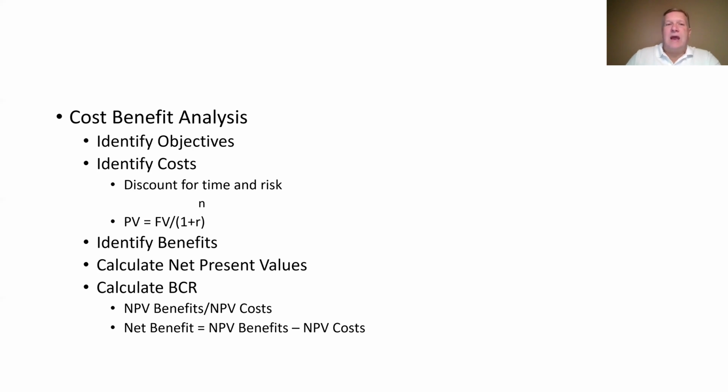We also have to discount them for risk. Whenever we are engaging in the construction of a public project, there is always risk that you have to assume. What's the risk that we don't get this project done on time? What are the risks for the surrounding area in terms of inconvenience? If we're going to build this senior center, we may be inconveniencing people because we're going to be closing off roads. There may be some interruption to the electric services, might be some interruption to the storm sewer. We're going to have all these interruptions that we have to take into account as well.